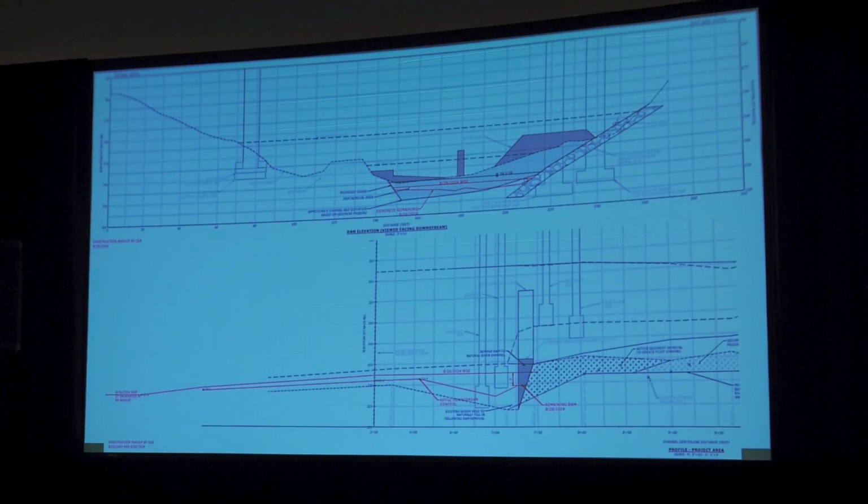Maybe that bar and that riffle was going to move, and if that bar and riffle did move, was that okay? So we worked with our project partners and funders and both regulators and non-regulatory people, the fish biologists that maybe don't need to sign the permit, but really needed some buy-in to make sure that the AOP goals were going to be met for the species. And the answer was yes, but it was a nice kind of check that we needed to go through to make sure everyone was on board with that field change.